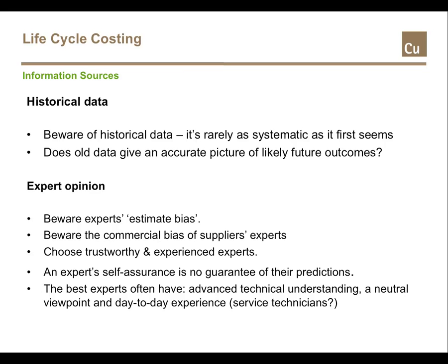The next step is data gathering. Whether you choose to rely on historical data or expert opinion, whether your choice of source is external or internal to the organization, you will face challenges. Beware of the quality of historical data such as maintenance reports, timesheets, and so on. This type of data often turns out to be far less detailed or systematically recorded than initially suggested. Try to have a clear view on what is recorded and how accurately that is done before using the data in your model. Keep an eye on the representativeness of your information.